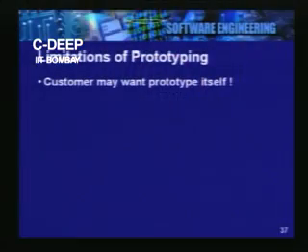Now, there are of course some limitations to prototyping. There are situations where prototyping is ideal, but at the same time we need to be aware of these limitations. First, the customer may be very happy with the prototype itself and may demand that the prototype be released for his operations or functions. Now, this is really not appropriate, because the prototype may work in the beginning for some time, but it may not be maintainable, it may not give the kind of performance, and it may not have the rugged design that is required for sustained operations.